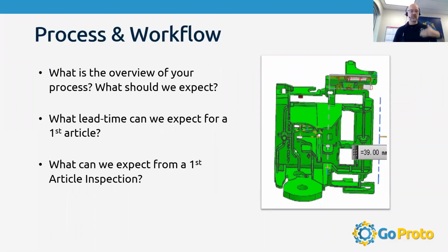So this is once we agree on those processes, like Matt said, that those previous processes are anywhere from, sometimes we can do it before the kickoff. If it's a rush project, sometimes it takes two to three days. Once the project is started, POs received, get started. And then once that's agreed, sign off, we're good, then we start constructing the mold. We'll actually start ordering and cutting steel. We'll provide feedback on schedule, which we'll show in the next slide.